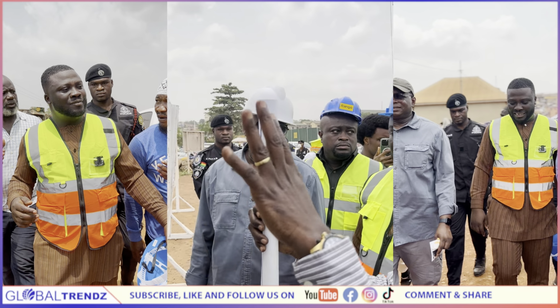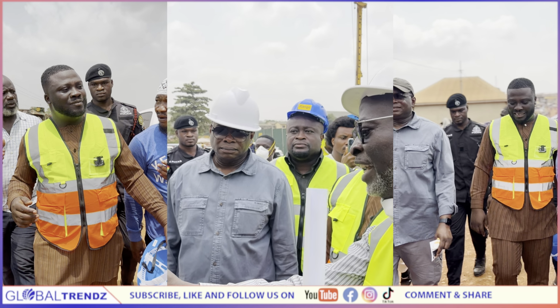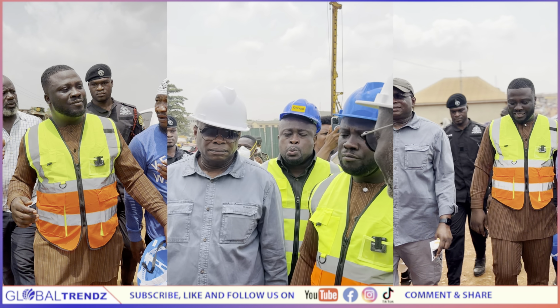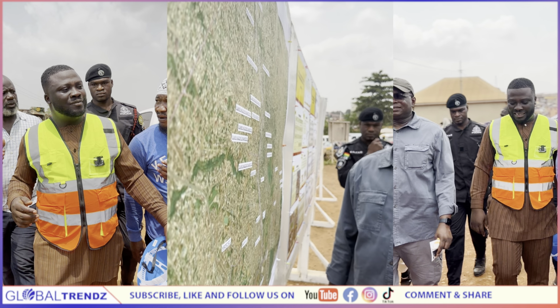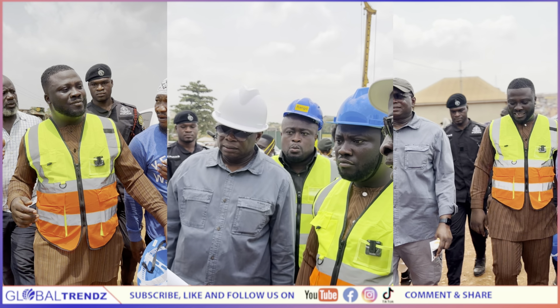These roads that we constructed, the idea is that when these roads are finished, it will allow and ease traffic here for when we start the actual interchange. Currently, as I speak, all these roads are in use now. These are the places that they use as bypasses to avoid coming into these areas.